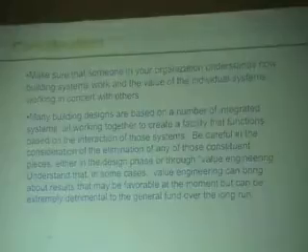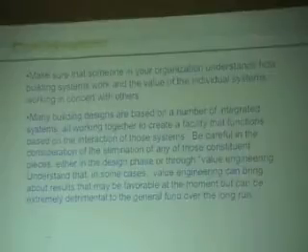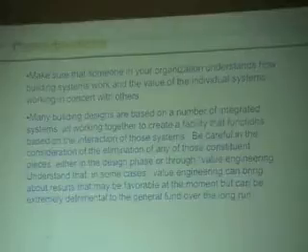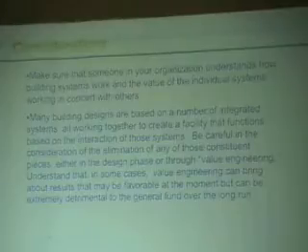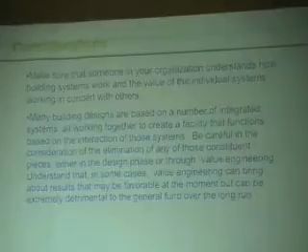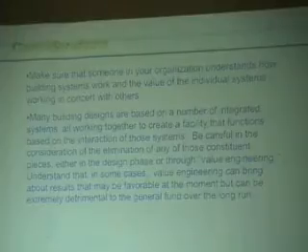They make recommendations to the administration, and without lots of background, they'll say, well, you don't need all those control points on your DDC system. You really don't need all those. And I would say, yeah, you do. If you want to save the energy, because you take away those control points, we're not going to save the energy, and guess where that money comes out of? You can put the money from a bond into paying for those control points, but I'm going to lose the money out of the general fund in energy savings.